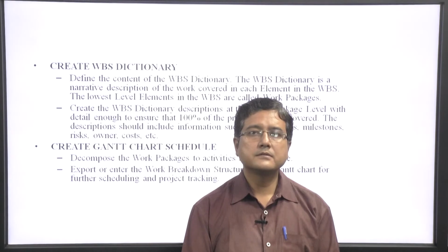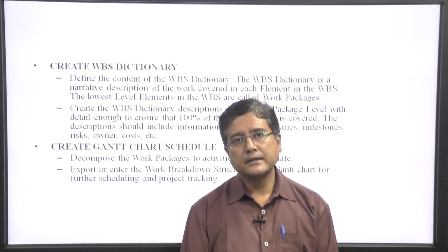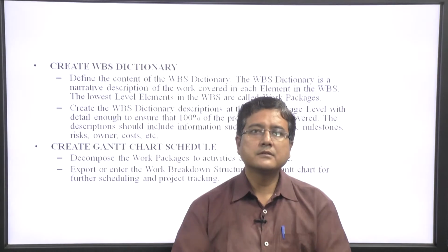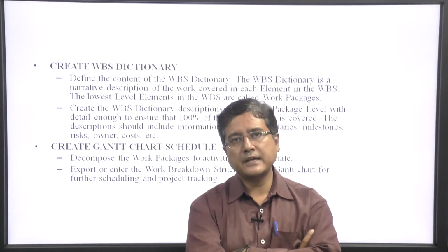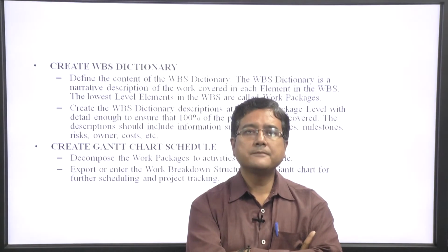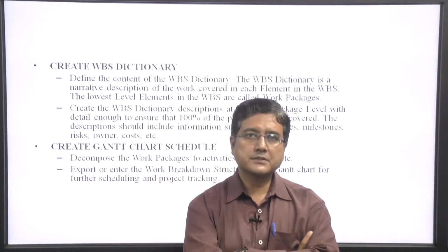First, wooden furniture work, then networking line, power line, and last, assemble the computers, upload the software, and then we test and finish.